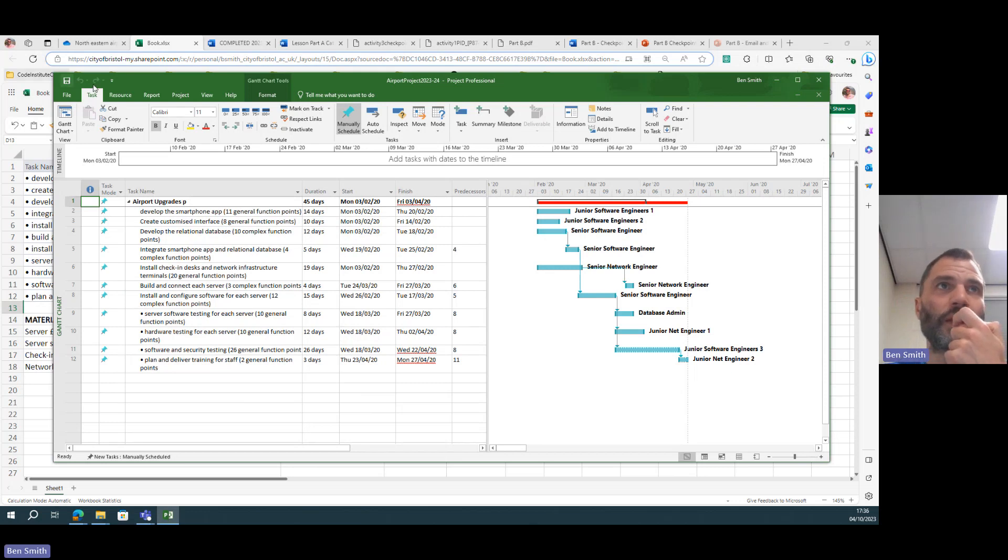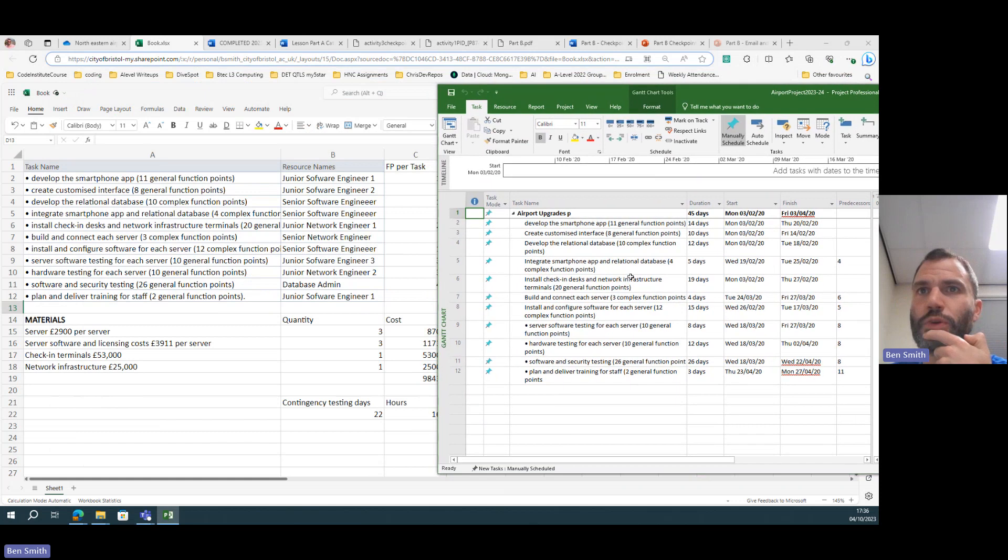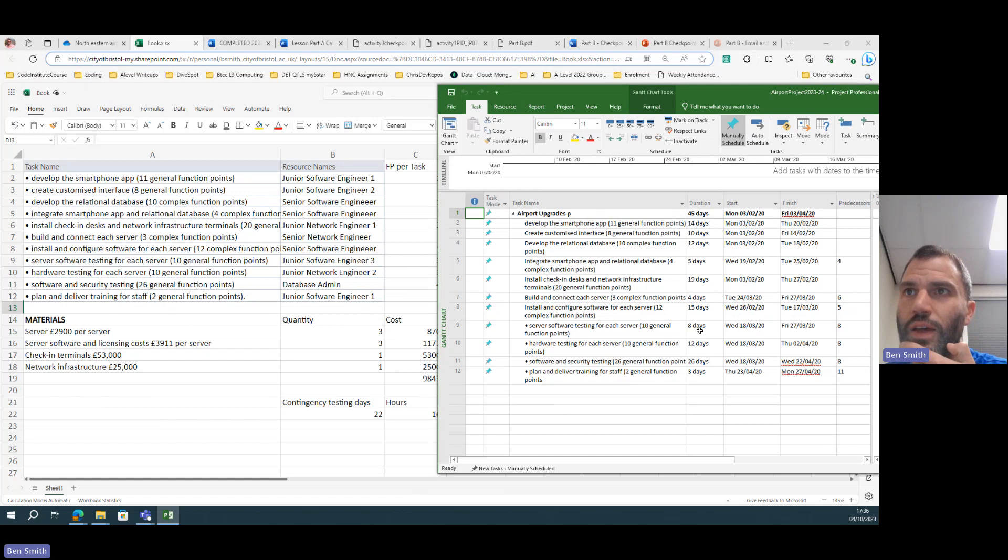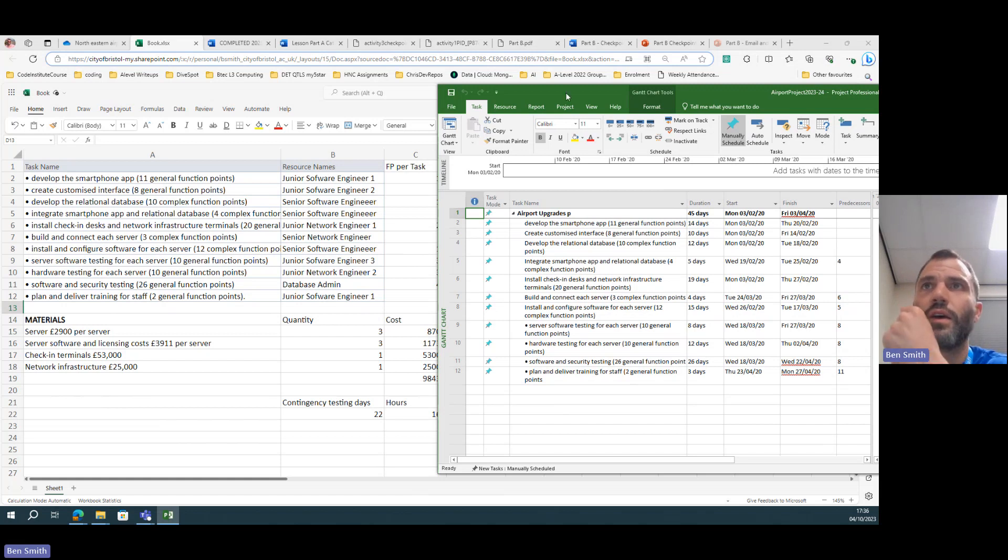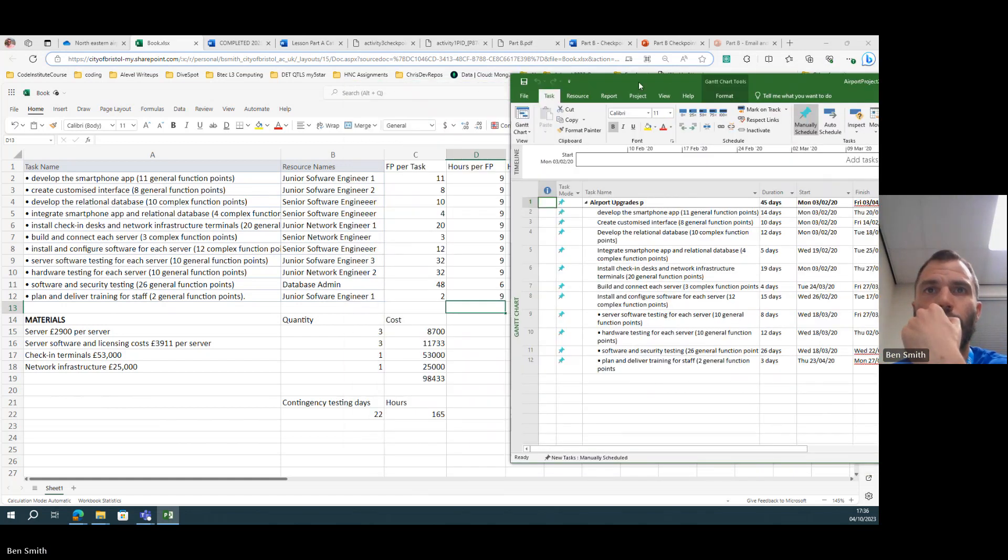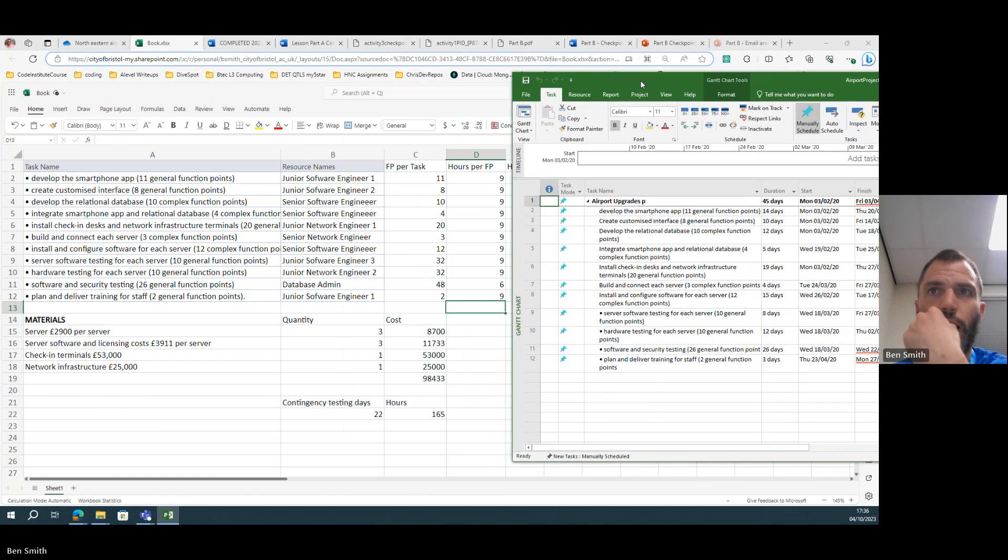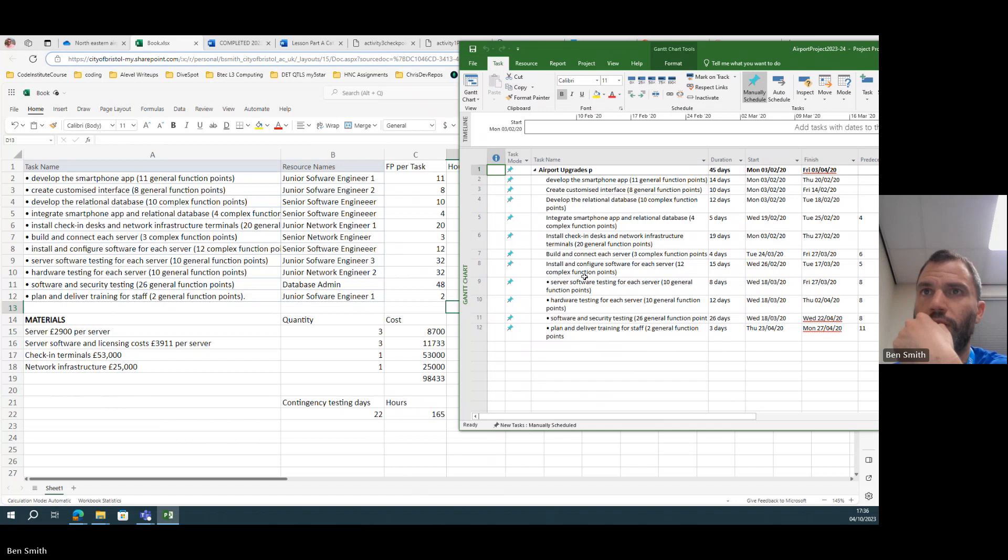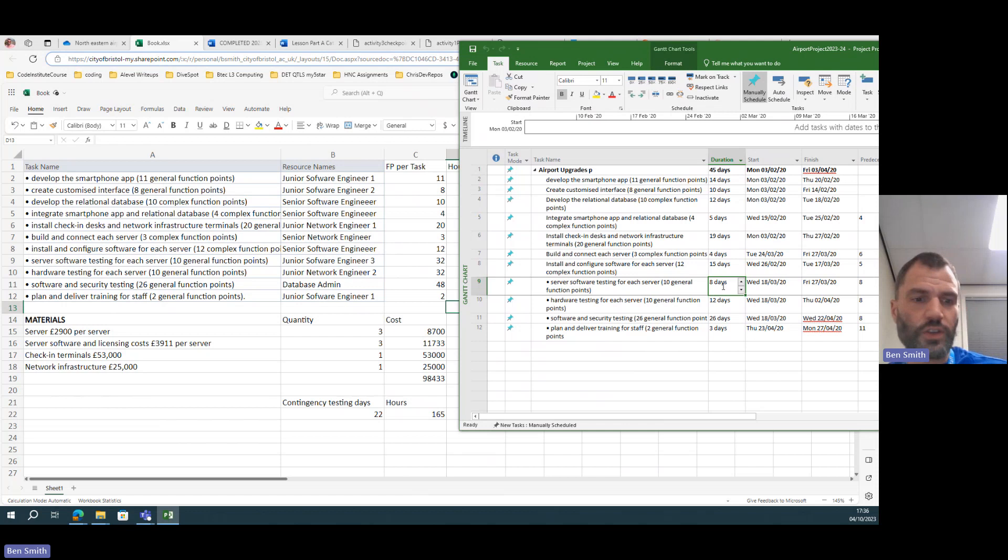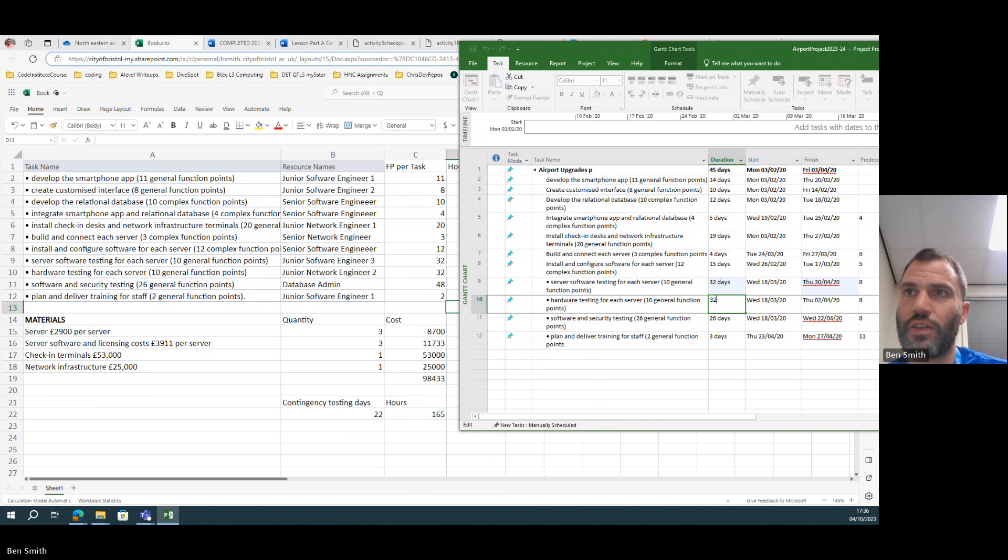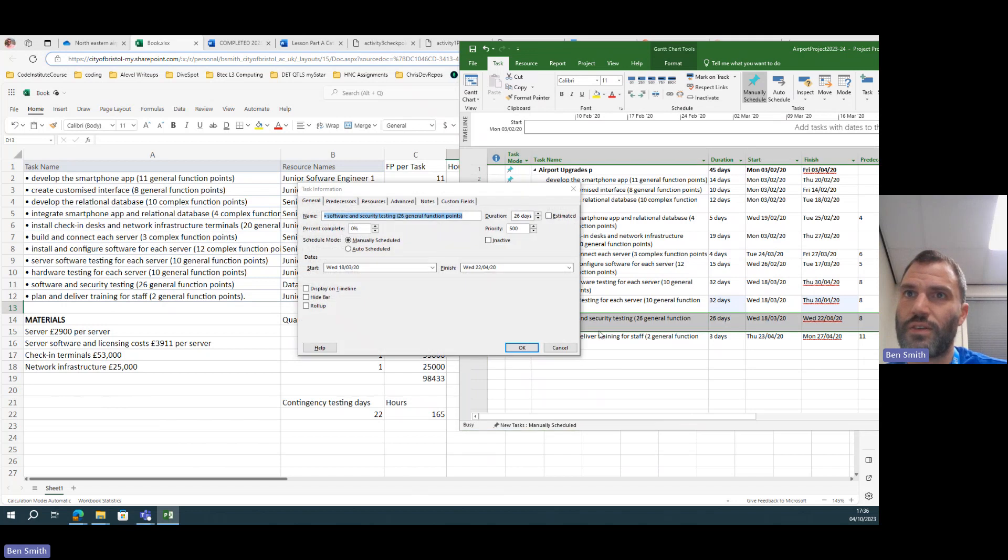So server software testing, I think this is the one I've done this year. Install server software testing. I've said it's going to take 32 days, that one is going to take 32 days, and this one is going to take about 48 days.